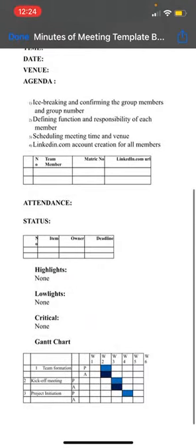So the kickoff meeting was done last week. It should be done in week 3, and then you should put it there as accomplished. This A is actually the notation for actual, and this P here is the notation for plan, okay? This is one example. You can have other means of doing a Gantt chart. You can find a lot of different templates and different formats. But this is the simplest that I normally used to have during my time, okay?